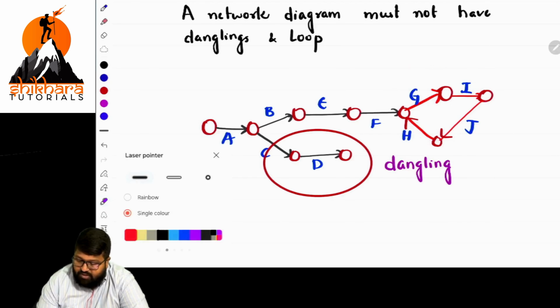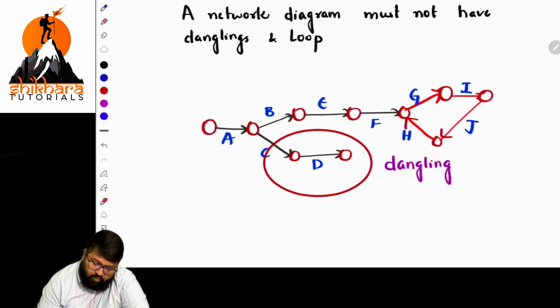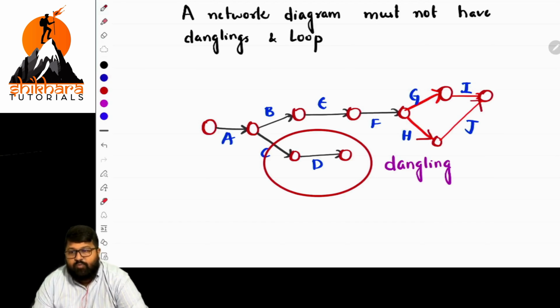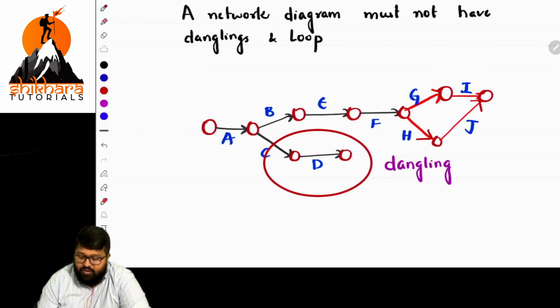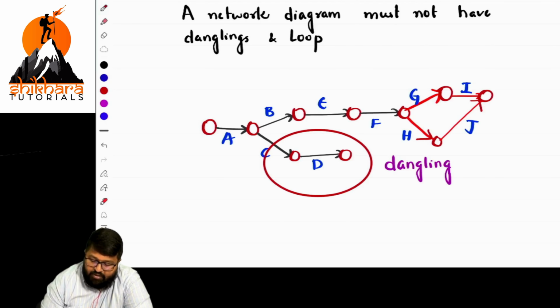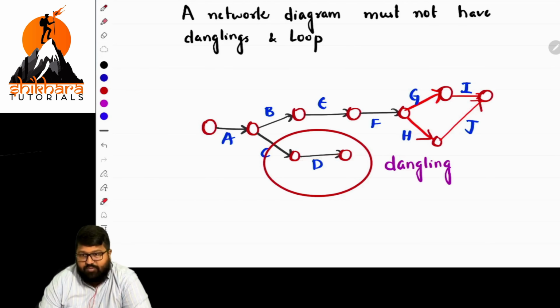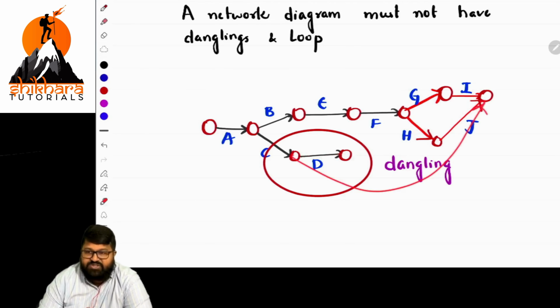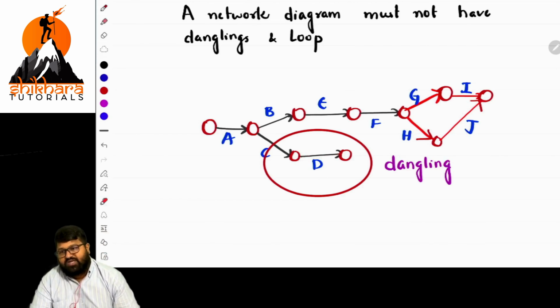Next, shall we go with other parts? Now, sir, to rearrange them, I am going with a proper presentation. The way of representation should be effective, and if you are not representing properly, it's gone. Now is there a loop? No. And in the case of this diagram also, to make it appropriate, we should extend the D portion till the I. Normally, we can arrange it properly, but I'm giving the information. So never there should be danglings or loops. Is it clear now? Next.